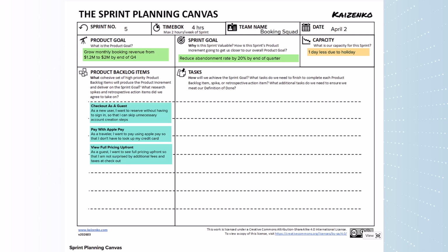In sprint planning, we are deciding that now is the time to work on these, and we're going to clarify any remaining questions, finalize the acceptance criteria, and review our high-level estimates. This leads us to topic 3, how or tasking.